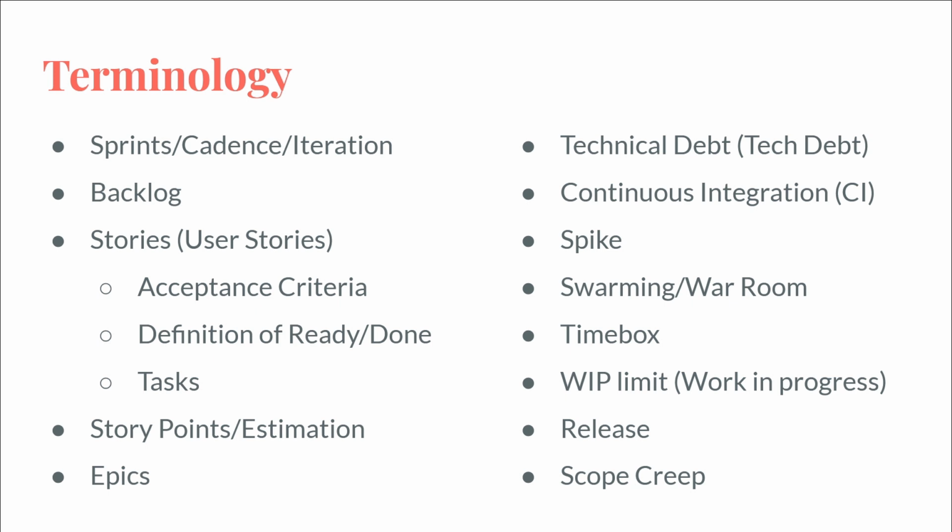Because what'll often happen, and this is where the estimation really shines, is here's the work, blah, blah, blah, blah, blah, 3, 2, 1. You said a 2, you said an 8. You know, a 2 is something you can get done in a day or half a day. An 8 is something that's going to take probably most of the week, maybe spill into next week, maybe a week and a half even. So, like, what's that like? Why did you think this is only a 2? Why did you think this was an 8?